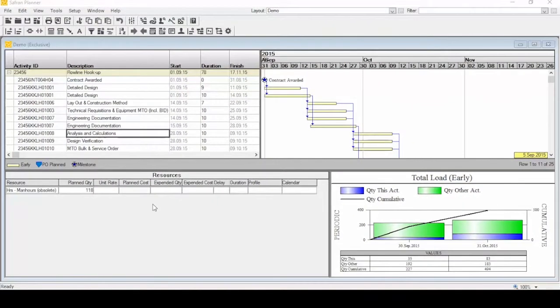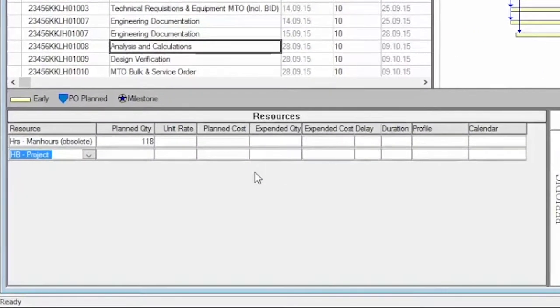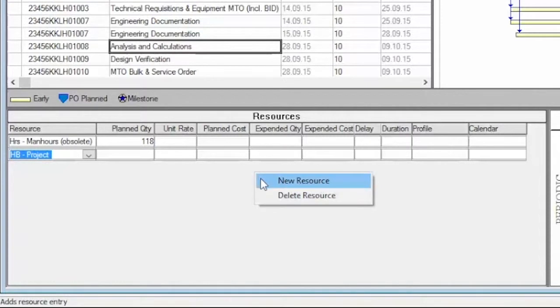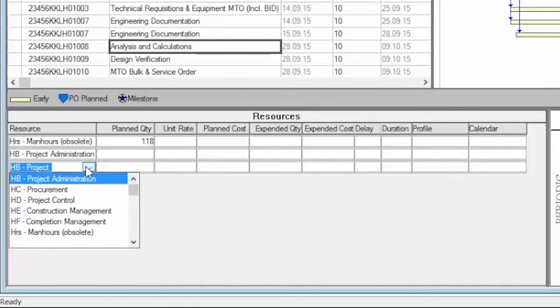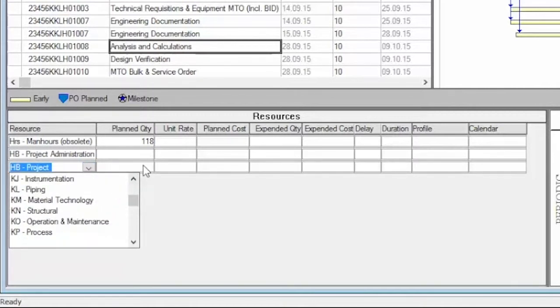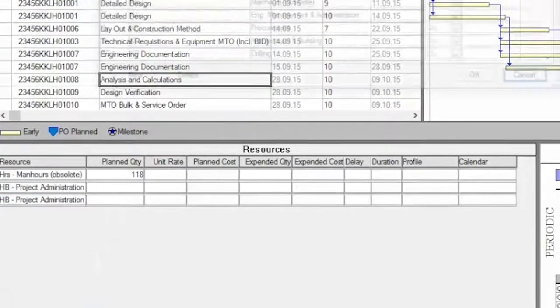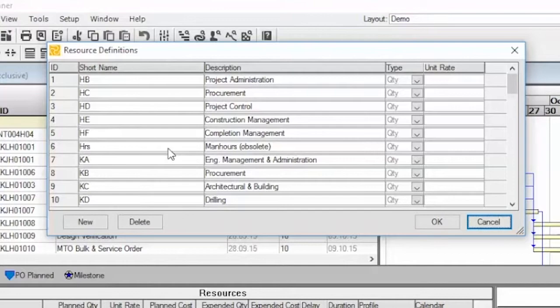Saffron Planner lets you plan with several resource requirements per activity. Resource availables are defined as resource definitions. You can create project-specific resource definitions or select from a resource definition set stored in the Saffron database.